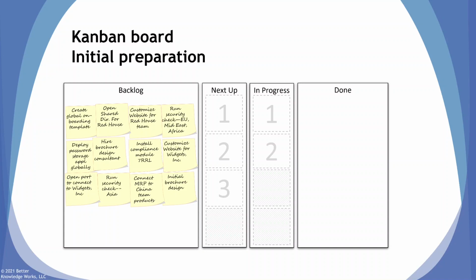Of course, I'm showing here a physical example with paper. We could do the exact same thing with PowerPoint or Excel or software. There's lots of ways to do this same thing. Now, remember, the Kanban works best with tasks that are between a few days and a few weeks long, and they're not deeply interconnected. Okay, they may have some kind of loose connection, but generally they're independent, and we can take them, let's say, more or less in any order.